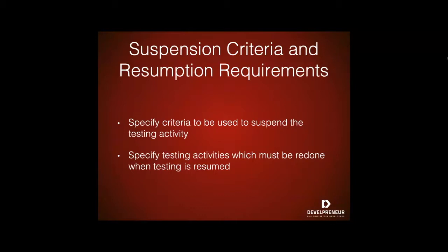So how do we determine this? Start by specifying what constitutes a stoppage for a test or series of tests and what is an acceptable level of defects that will allow the testing process to pass. Testing after a truly failure event or fatal event will generate conditions that may be identified as defects, but are in fact ghost errors caused by an earlier defect that was ignored. So if you keep testing after a particular test failed, you could potentially get additional failures based off of that earlier test. So now you're getting some additional defects that really don't apply. It's just because the first test failed.